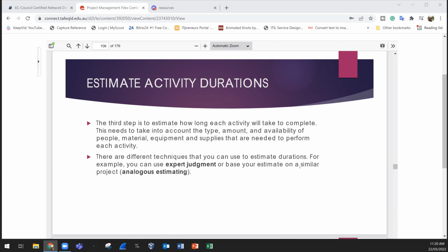Good. Another trick. If I have a task, and this task will need 10 working days, but the duration will be longer, because we have 2 days off in the middle as a weekend.